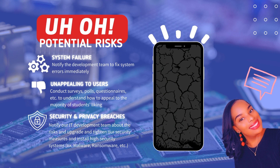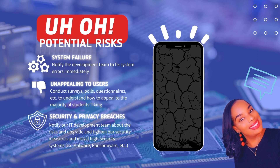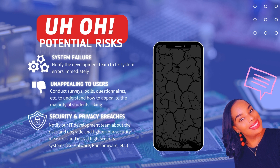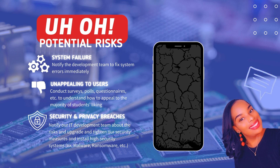It's time for the potential risks. We narrowed it down to the top three. The first one being system failure — app crashes, glitches, connection issues — and how we're going to resolve that is through risk transfer: we notify our development team to fix system errors immediately. What if our app is unappealing or useless to our target audience? We resolve that through risk mitigation — we conduct surveys, polls, and questionnaires to understand how to appeal to the majority of students. And third, what about app security and consumer privacy breaches? We resolve that through risk transfer, notifying our IT development team about the risk, and risk avoidance — we upgrade and tighten our security measures and install high security systems, for example against malware, ransomware, and so on.